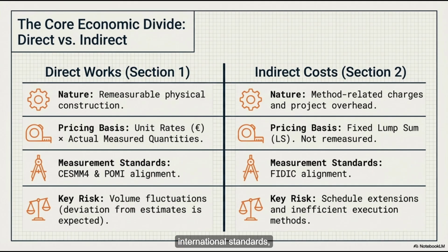Exactly. Without those international standards, a contractor could artificially lower their overall bid just by using a different definition of how topsoil is measured. So they could game the system. Totally. But CESMM4 and POMI eliminate that.